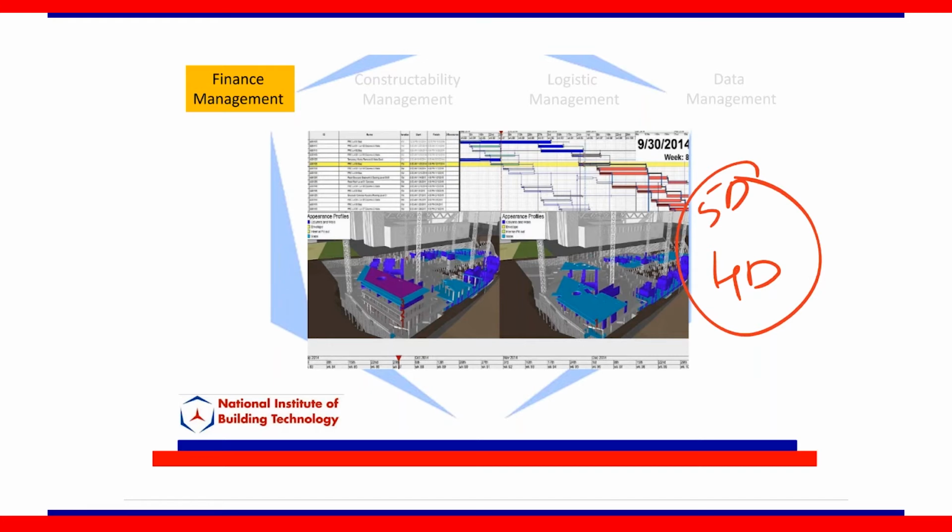But these two in conjunction are very important, because you can run your cash flow analysis and show a banker, show an owner and say, listen, this is how we're going to build your building, and look at how the building gets built and how much we're billing you every month and how much work is done. Okay, so they can see a visual representation of how the project gets built and how the money is spent on a project. Okay, they might say, no, I don't want this phase to be done here. I don't have this much cash up front. Can you push this forward?